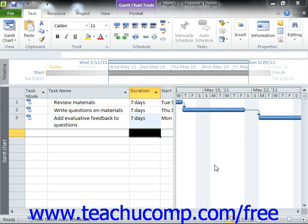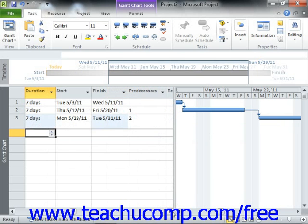For example, you could allow a day of lag time to pass between tasks. Alternately, you could also allow for lead time, where you begin working on a second task before completing all of the work on the first task. You can edit the duration shown in the predecessors column within the Gantt chart view of your project file to enter a lead time or a lag time.